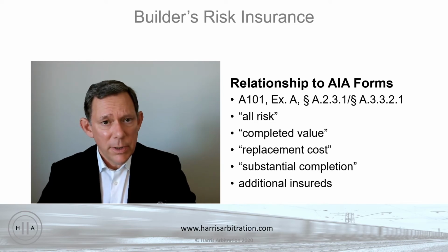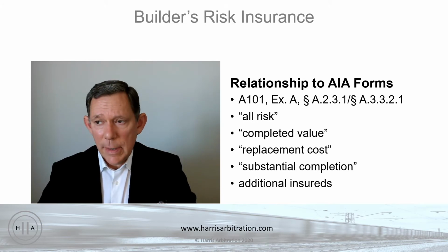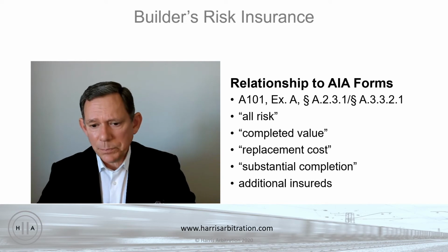And in order to really make whoever suffered the property damage whole, what you really want is replacement value coverage, so that the insurance company has to pay for whatever it's going to cost to replace the damaged property, as opposed to just whatever the fair market value of that damaged property is, to compensate for the loss in fair market value.